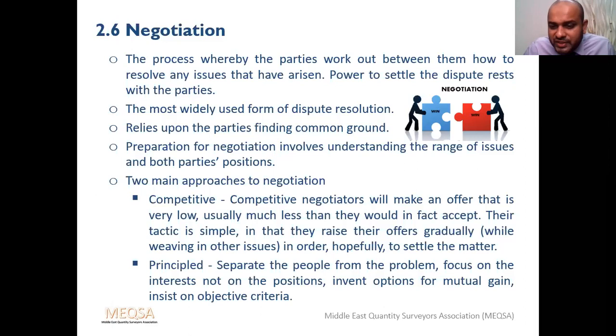For example, if both the parties are in trouble or in a dispute, both the project managers can come to the picture and discuss the issue, as they will focus only on the problem. But if both the QSs go for the negotiation, the ego will be there, so definitely the issue will not be resolved. So here you should mainly separate the people from the problem. Just focus on the problem and focus on the interest, not on the position.